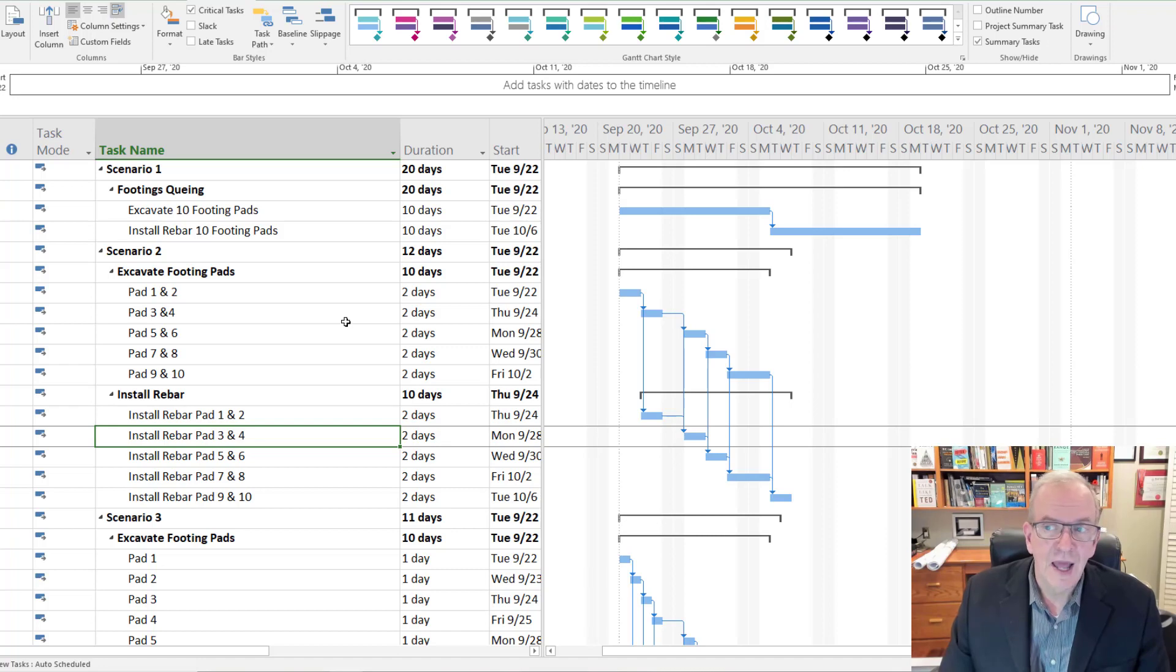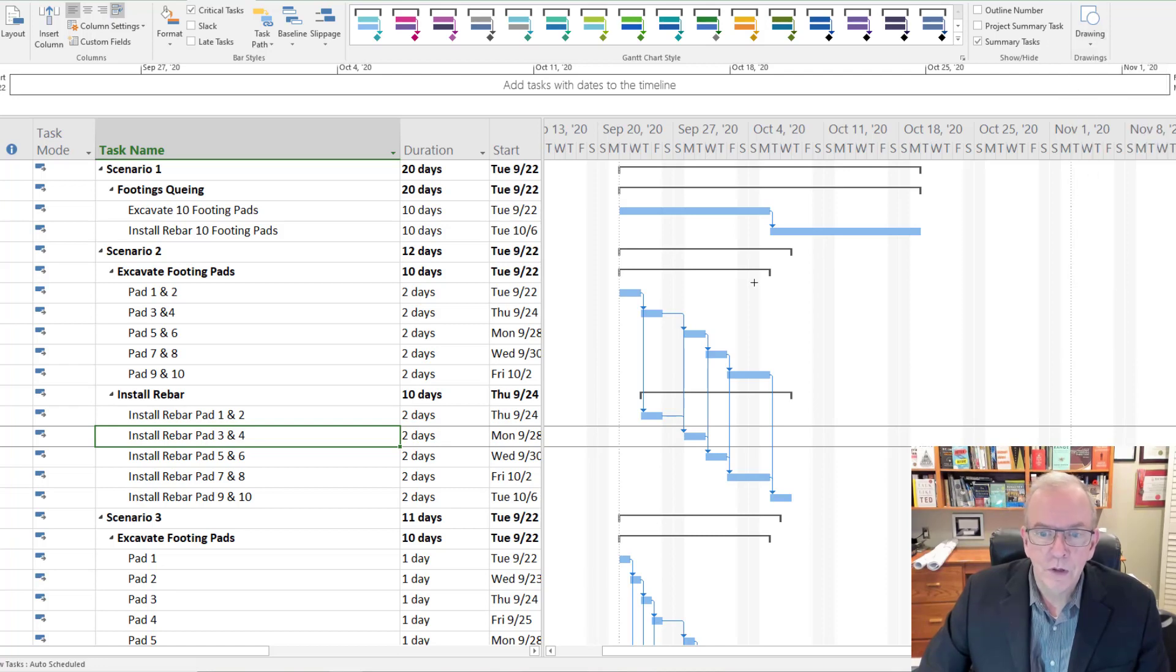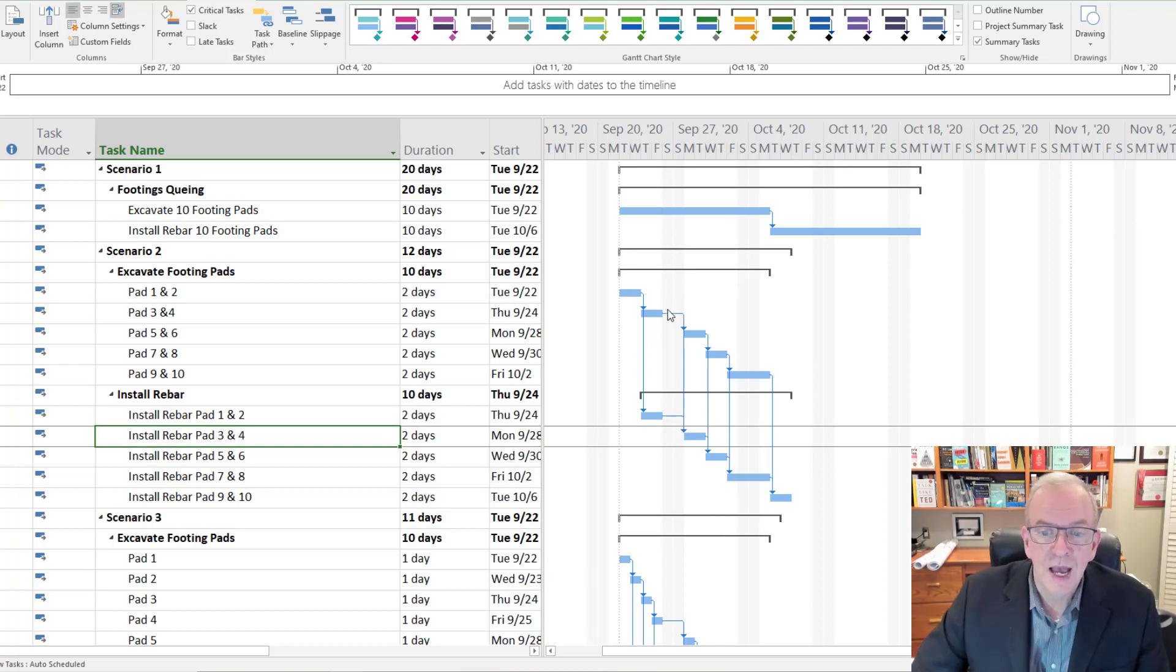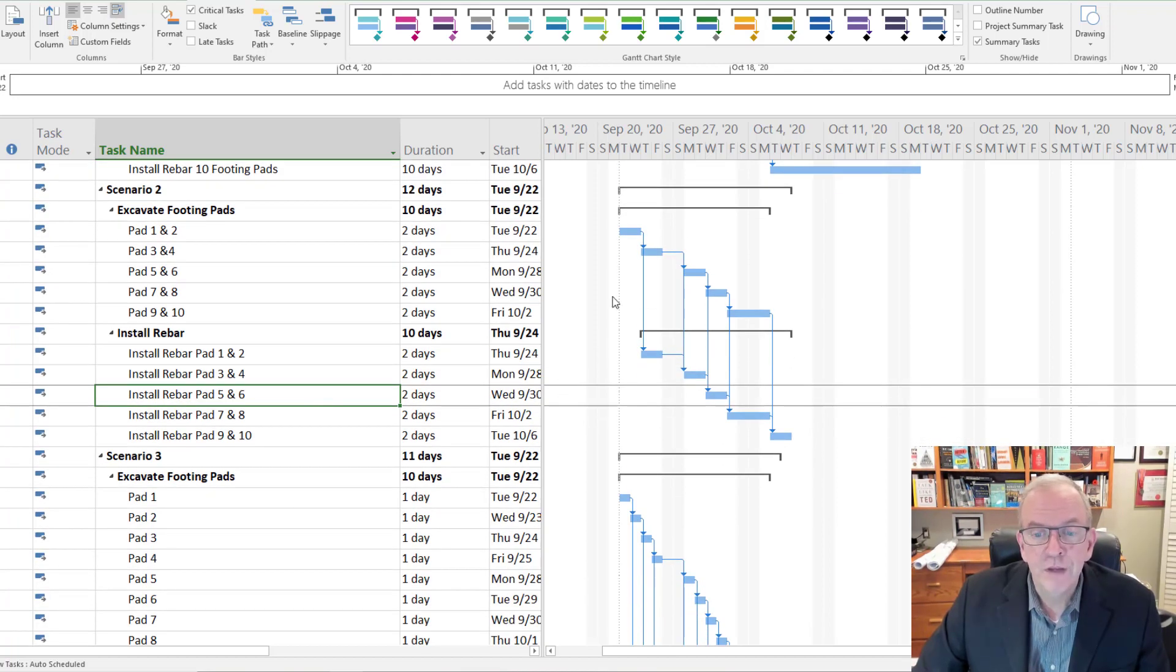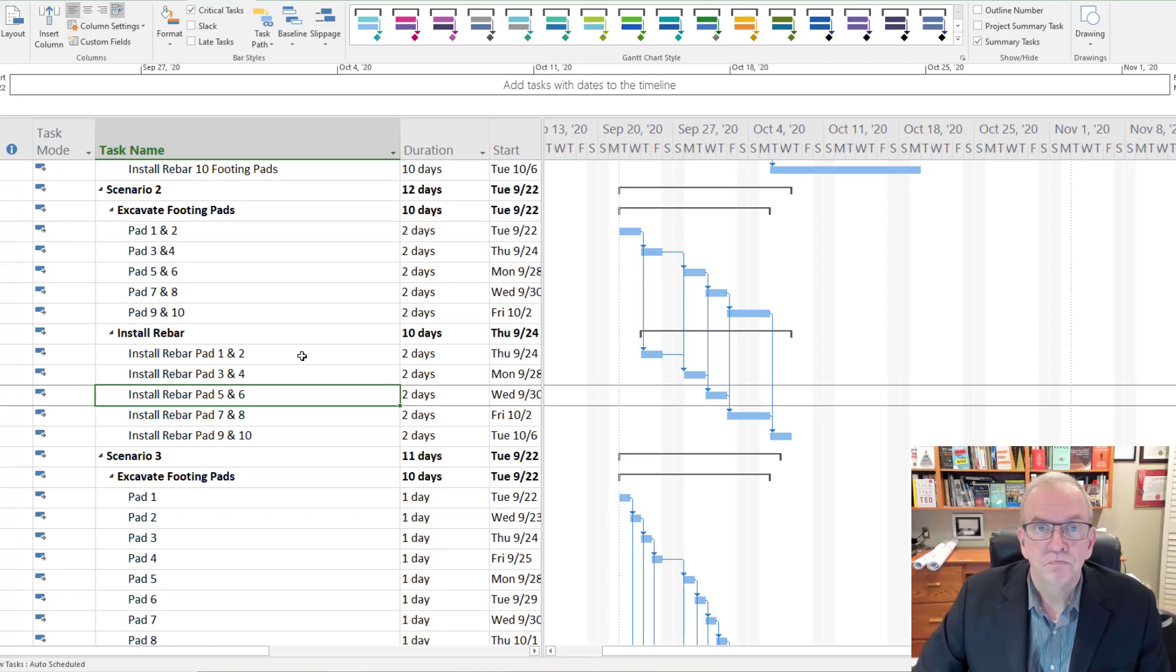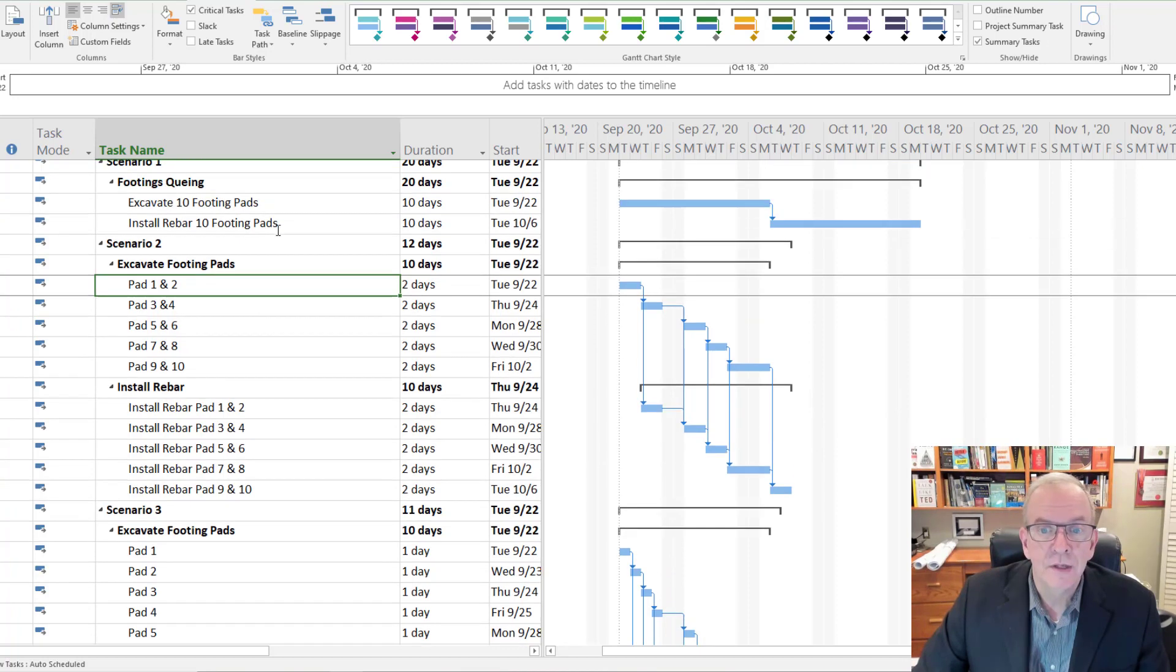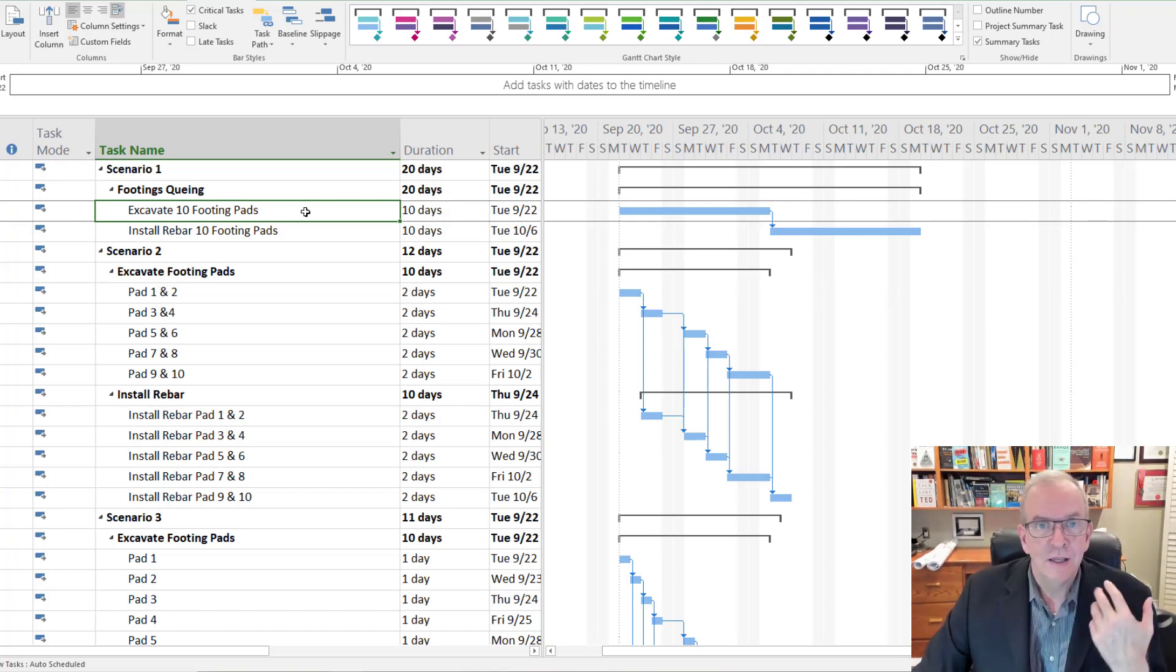Having this nice rolling effect and making the batch sizes as small as possible. The other thing that happens here is that we've got that flow of work moving from one area to the other. We've also got a feedback loop that's going on there. When I finish this and I start this after two days, I'm going to have a feedback loop that says, install rebar, hey, you didn't excavate this deep enough. Oh, we didn't excavate it deep enough. Okay, point noted. We'll finish excavating that and then we can fix that. We're only fixing two pads. Here, we got to go back and we got to fix 10 pads. So the feedback loop where you're getting information back that the work that you did previously is good is very quick.